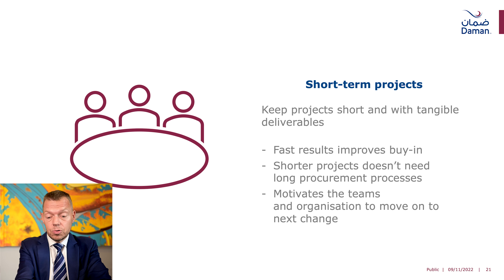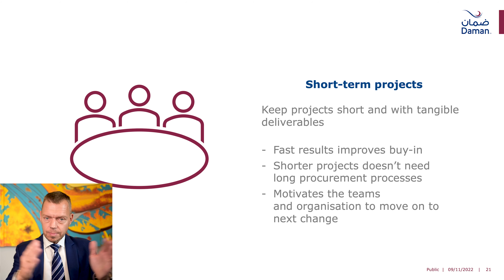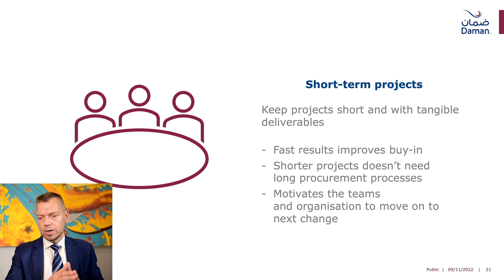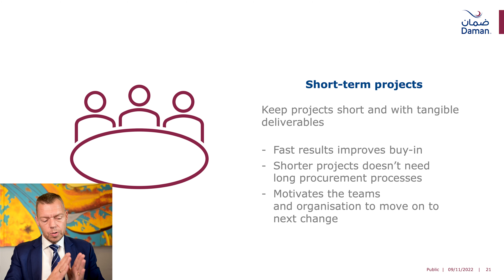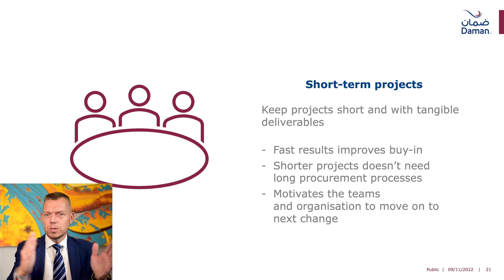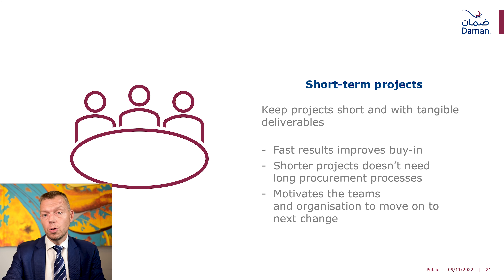If you do this as short-term projects — three months maximum with tangible deliverables — you and your team can show the rest of the organization it's actually working. You'll deliver value faster, with smaller investments. Even large change projects can be cut into sizable chunks that deliver value individually. Yes, end-to-end it may take longer, but instead of waiting 18 months for a project to finish before delivering any value, you start delivering value immediately — perhaps six times more value to the company. And you'll celebrate successes much earlier.